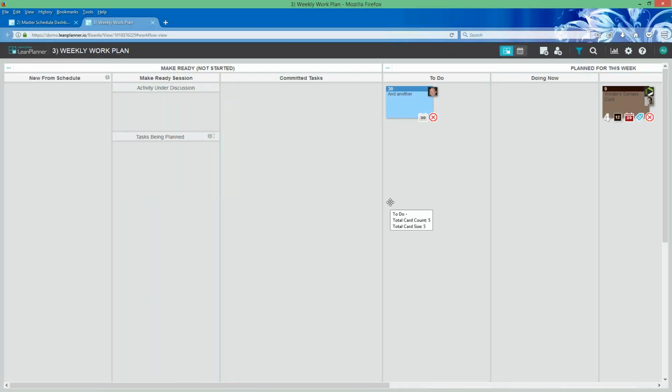You apply the context of a board, that's the organizational concept there. You say, okay, this board is for managing the overall view of the world. This board is for managing our team of 5 people's next 2 weeks. This board is for managing Stahl's 6-week look ahead milestones. But you can make connections between cards and between boards, and have those pieces of information roll up and flow back down.